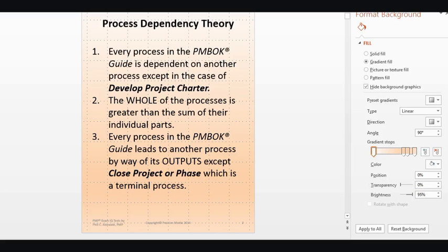Every process in the PMBOK Guide leads to another process by way of its outputs, except Close Project or Phase, which is a terminal process. What that means is, when you get to Close Project or Phase, the outputs don't go to other places — they lead to the organization's repository.